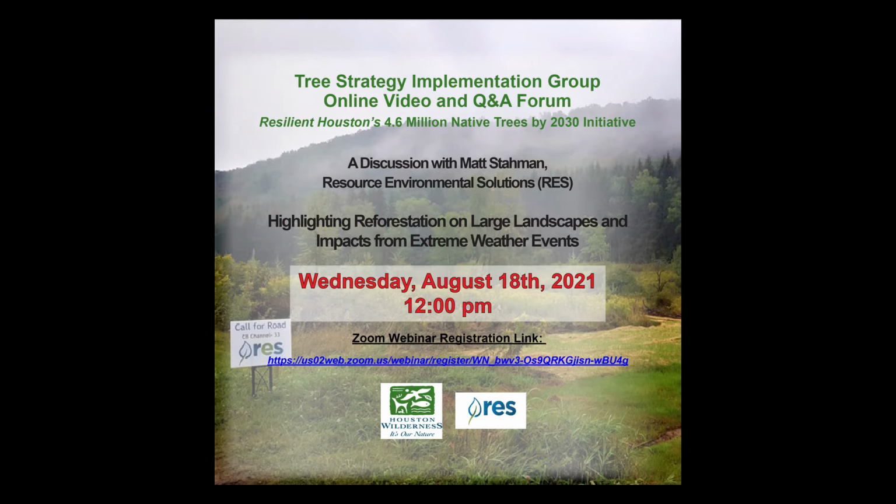I apologize. So the ratio. If you impact 1 acre of wetland, you replace 3, 4, 5, 6, 10 acres for every 1 acre that you impact, depending upon the quality of that wetland and the type of the mitigation that you're proposing, whether you're proposing to completely restore something or simply enhance something, which is a lighter amount of effort, or just preserve it, which doesn't really require on the ground effort. It just requires conservation easement effort and whatnot. So depending upon the mix of those two factors, the ratios, where they still use ratios, will go up.